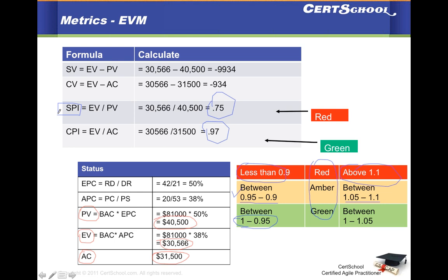Like I'll use the same example I was using, that you have a 3-month release cycle and you're at the end of the first month and you come out with these numbers. You still have 2 months to make up for a lot of things. Imagine if you had found this towards the end of sprint 3. If you were not doing all these earned value management calculations, you would only come to know when you see a ton of stories at risk at the end of sprint 3, which would make you look really bad as a Scrum Master or agile coach.